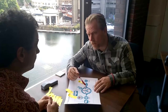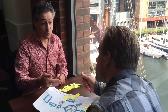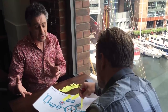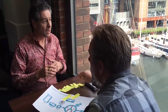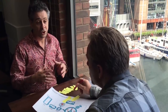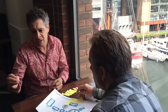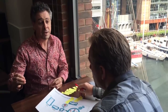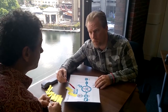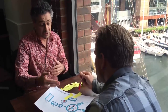So that's the first change that a team down in the bowels would notice. That's the first one, because if they're used to having just a review where just their work is looked at, they're now forced to have a larger picture where everyone's getting together to look at everyone's work and to get that feedback. Because the feedback that you want isn't from an individual team's effort, it's feedback on the entire integrated increment. Okay, so everyone's going to end up more knowledgeable about the entire program. You need to be able to spread all of the feedback to all of the teams, and this is the mechanism to do that.